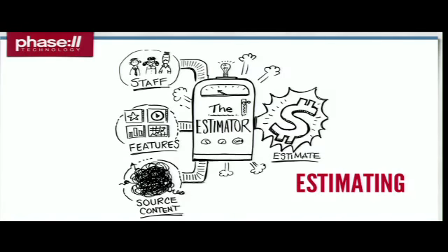We often also do a top-down, so we do two things to meet in the middle and get 2 data points. We have a project manager do it from the top. Developers and everyone else on the team do it from the bottom. It gets rolled up, and the third data point is often a related project. So we go into our project repository and say, what project have we done in the last 5 years that looks most like this? And not what did we estimate that at, but what did it actually take? And now we have a real data point. And those 3 data points, if they're correlated around something, give you a pretty good sense of where things are going to end up.